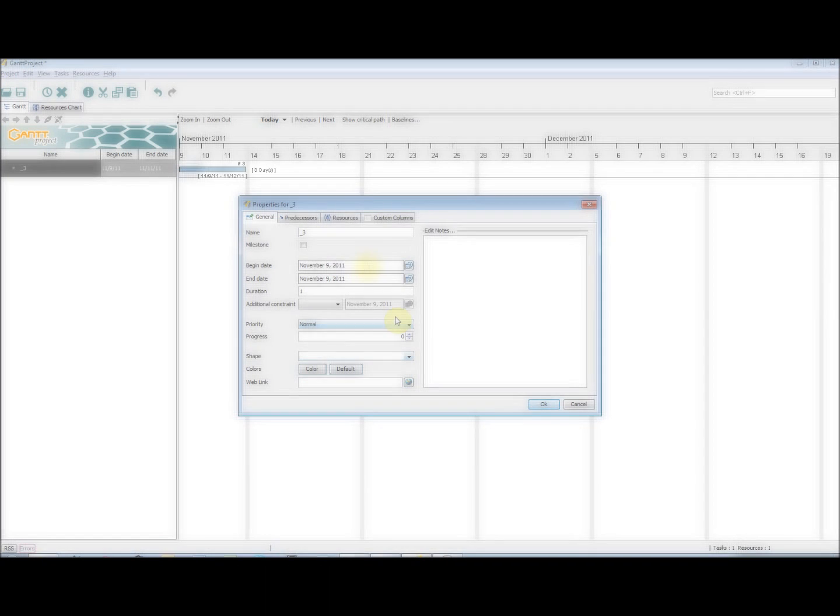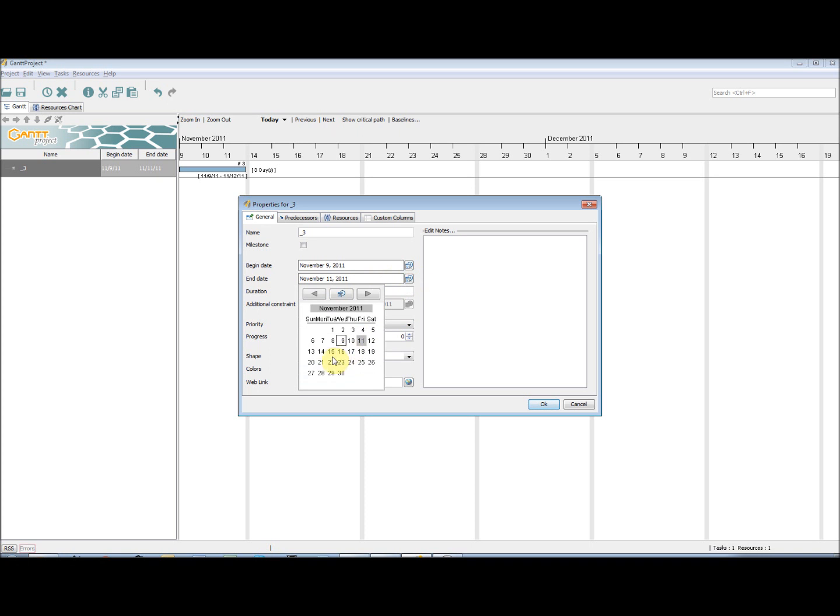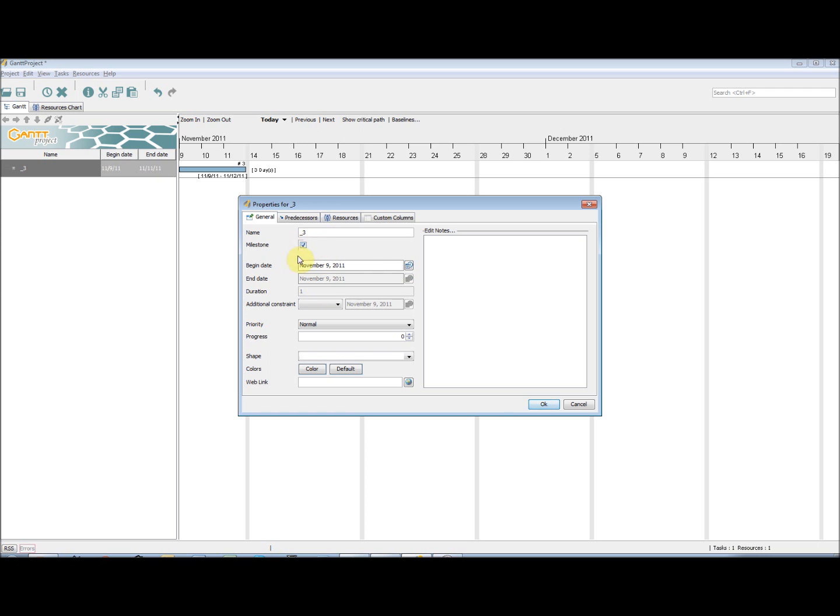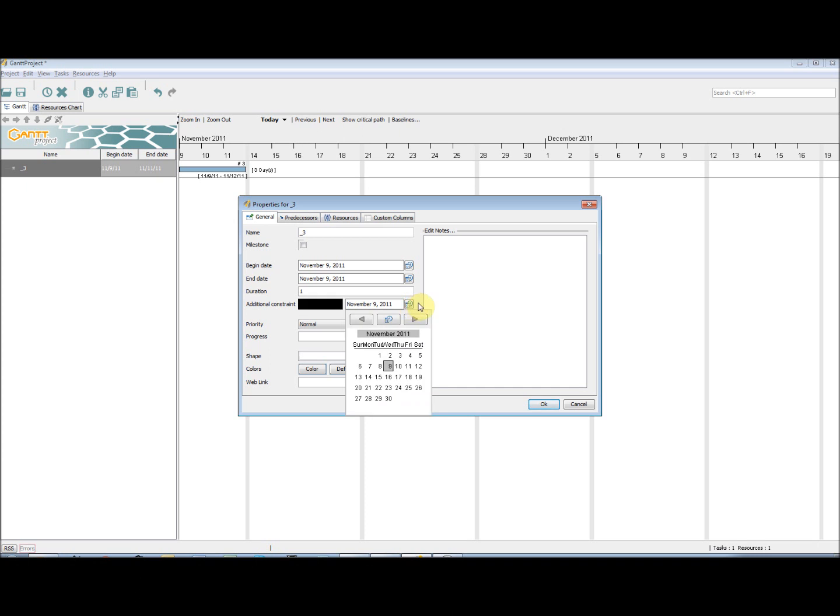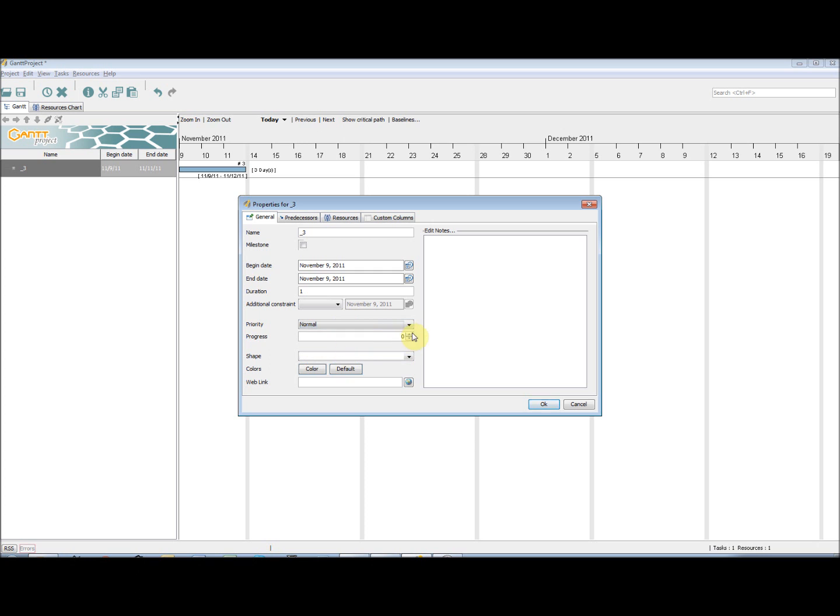We can change the start and end dates or set the duration to be a certain length of day. Please note that the smallest time unit is a day and so task duration cannot be defined in terms of hours. We can also set the task to be a milestone meaning it is a state rather than a task to be completed. We can also create an additional constraint on the earliest start time. This is useful when a project is running ahead of schedule, however a certain task still cannot start until a certain date. We can edit the priority of a task and update the percentage complete, as well as changing certain graphical options.